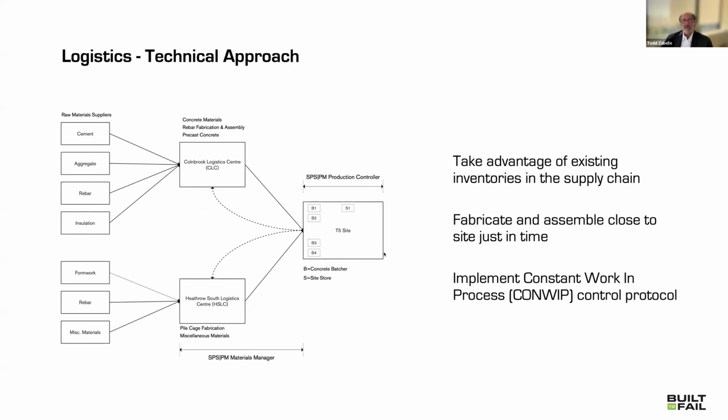From a logistics perspective, everything flowed through logistics centers because the idea was to shield the site from the variability of over-the-road traffic and the rest. Anybody that moved between a logistics center and the site had authorization to move in and out of the site and within this zone. So it's basically quarantined, all right? What we didn't want were new drivers showing up and roaming around out there who didn't know what they were doing. Things got delivered to the logistics center, they spent the night there, and then they were brought in, okay?